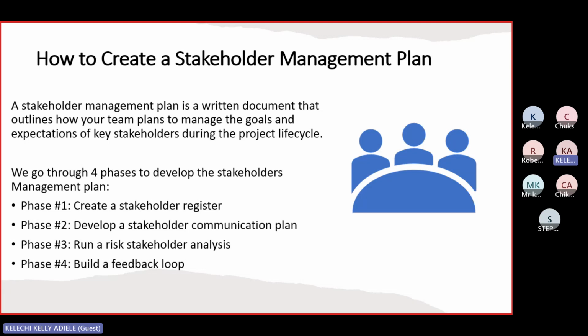Remember, we are still at the prepare phase. So you have to plan how you're going to engage the stakeholders. You have to know them, put them to have a register. It's not just to know them in your head. You have to come up with a documentation we call the stakeholder register. So when you go for interviews and you are discussing about your involvement in projects, you should also talk about this side of what you did.